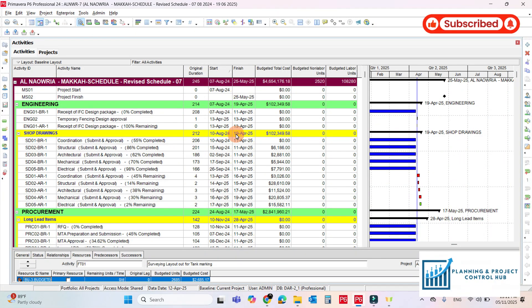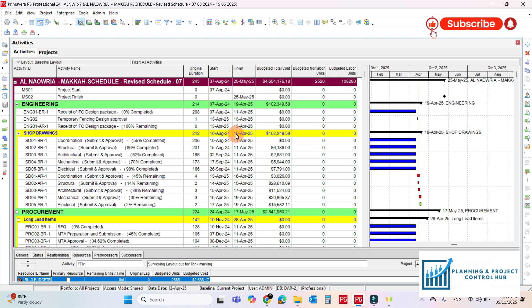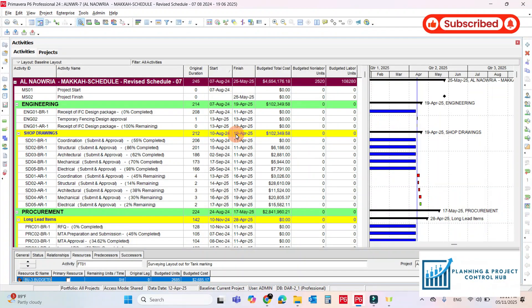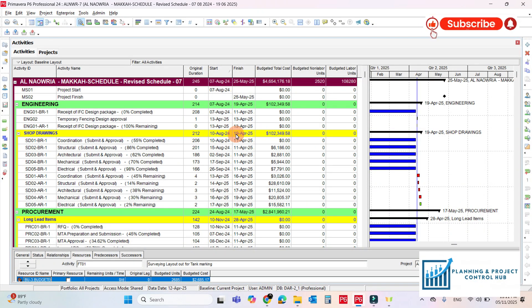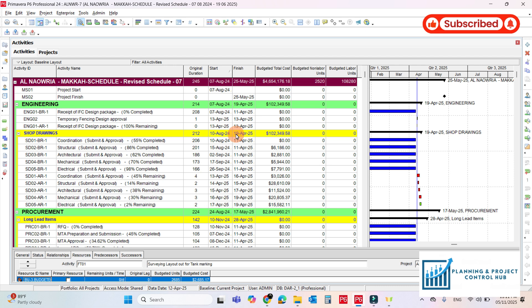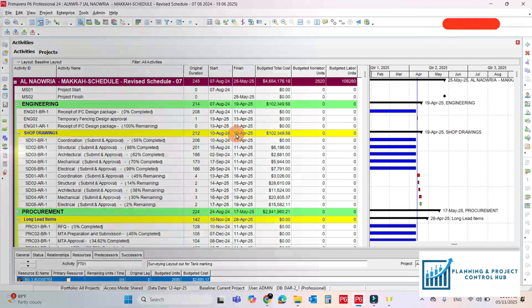Sometimes we need a recovery schedule where we have to reduce the duration and ramp up the resources to bring the project back to the original milestone. This phenomenon is also called fast tracking. So the duration for the not started activities we have already reduced and now we have to ramp up the resources.